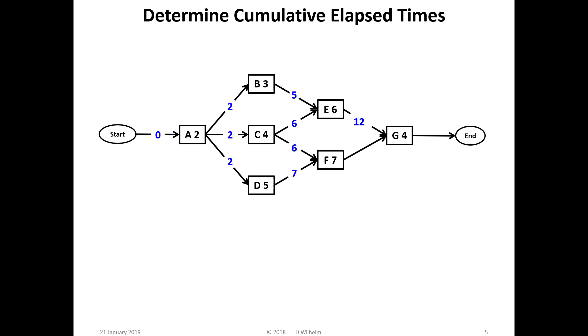Task F also has two prerequisite tasks, can start after day seven, takes seven days, so is complete after 14 days. One more task to complete. Task G can start after 14 days, takes four days, so is complete after 18 days. And we're done. The project cumulative elapsed time is 18 days.